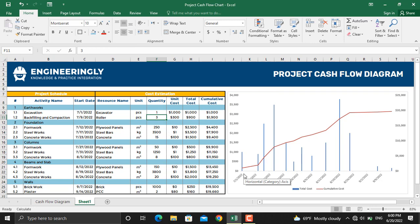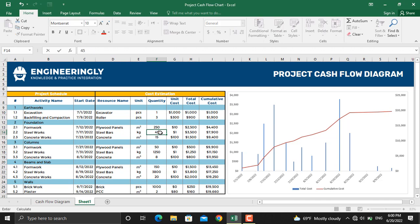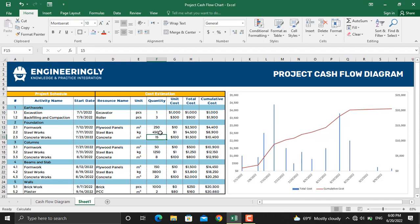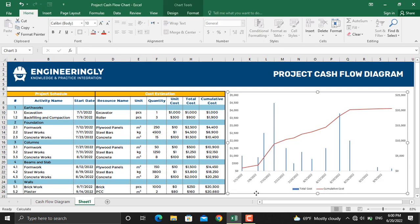Besides that, let's update the number of steel bars to 4500 kilograms. As you can see, the amount of money needed at the specific date is updated and besides that the curve for cumulative cost will change as well.